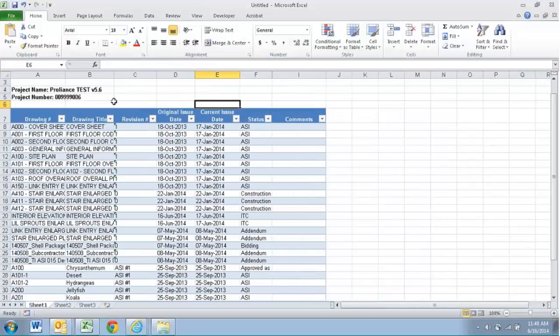But get your Exhibit B out of there and save it to your J drive so that you know that this is what my subcontractor bid off of. This is what I need to include with their contract. This is the Exhibit B that they need to see.